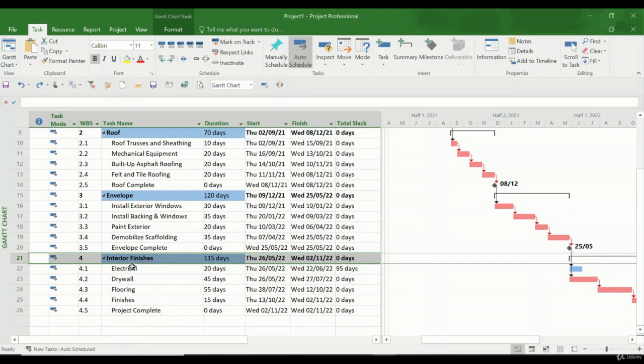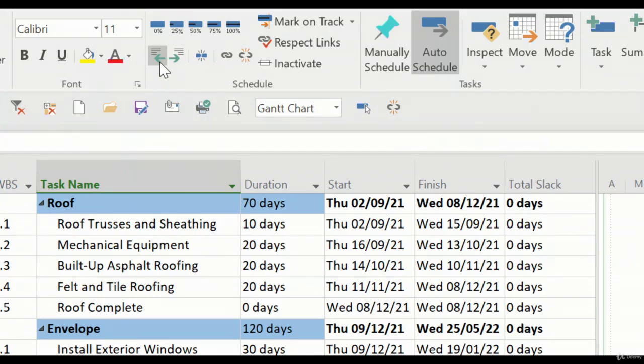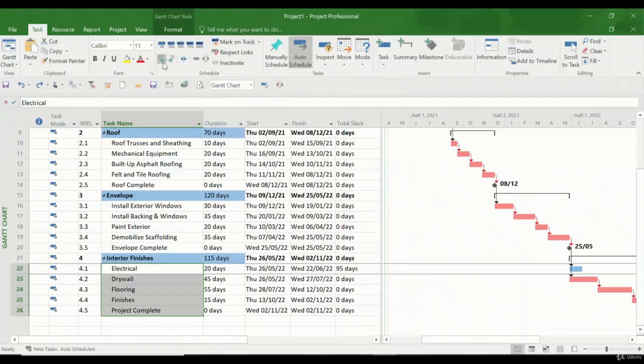The way it works, if you want to delete one summary task and you don't need it anymore, but you need the following tasks, you have to remove this one as the summary task, and you simply click the other activities. If you recall, I come to the task tab, and then you can just press here. Here we have the indent option, and we have here outdent task.